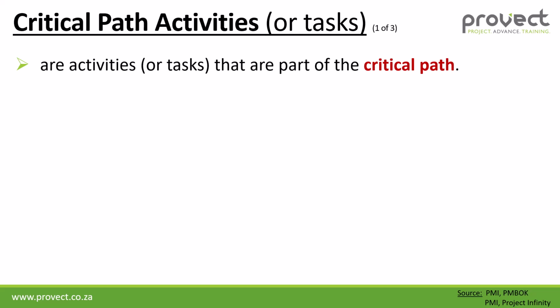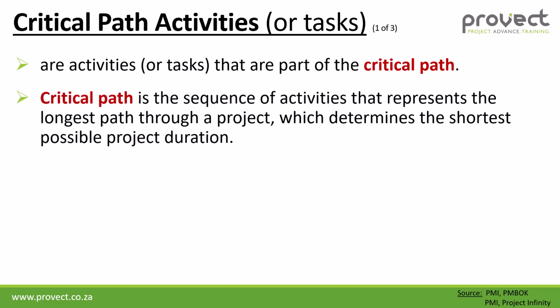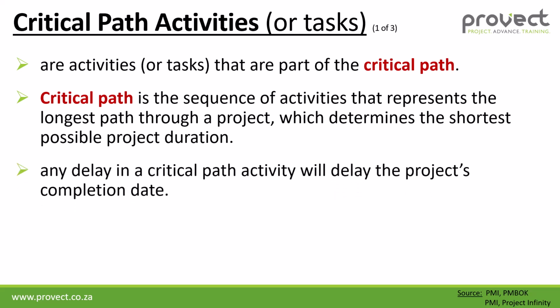project. Now what is a critical path of a project? This is a sequence of activities that represents the longest path through a project, which determines the shortest possible project duration. And any delay in a critical path activity will delay your project's completion date.